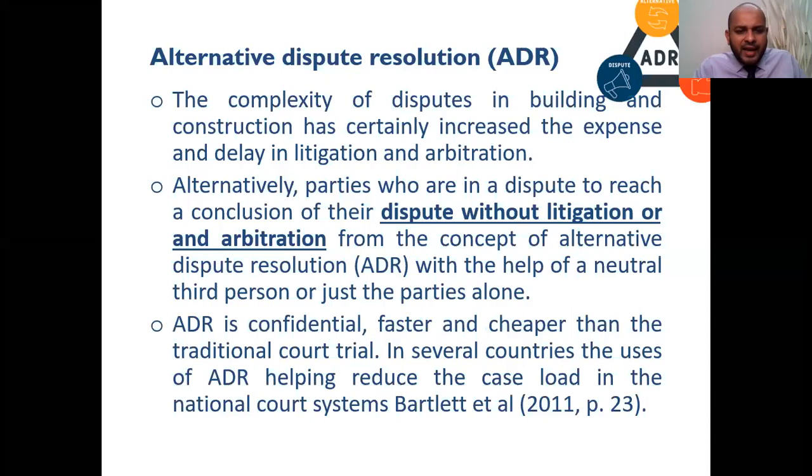ADR is confidential. Nobody knows you had a dispute, mainly for the contractors and the client. They can keep their reputation. It's faster, mostly for on-site issues, and cheaper. You only pay for some hours of a local lawyer or a contract administrator, compared to the traditional court system. At the same time, arbitration as well.